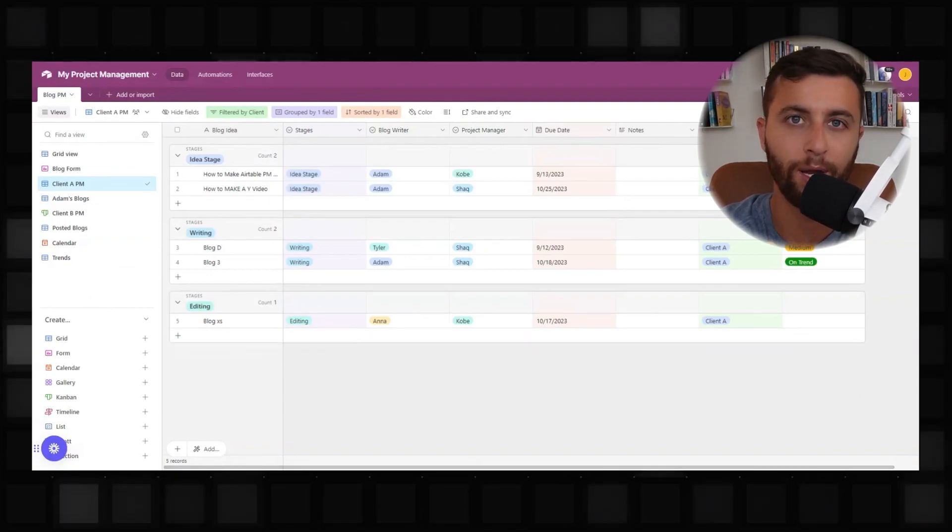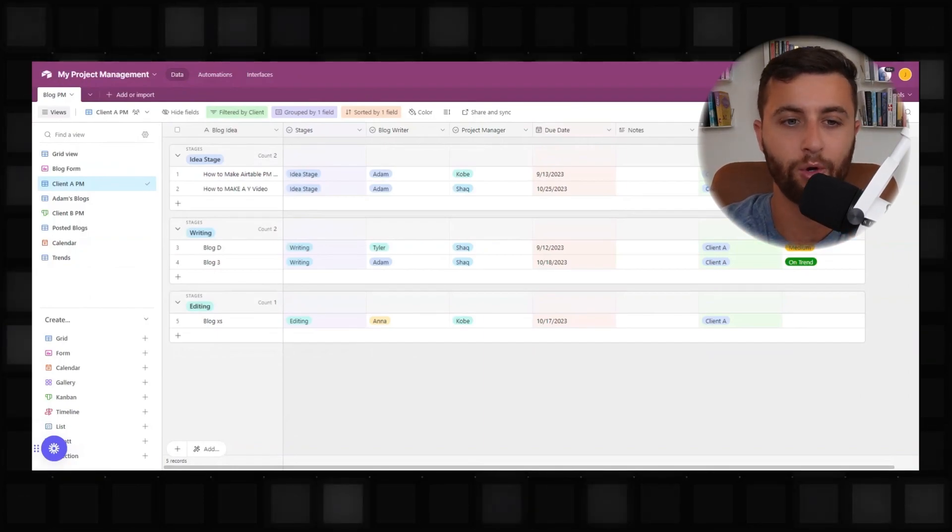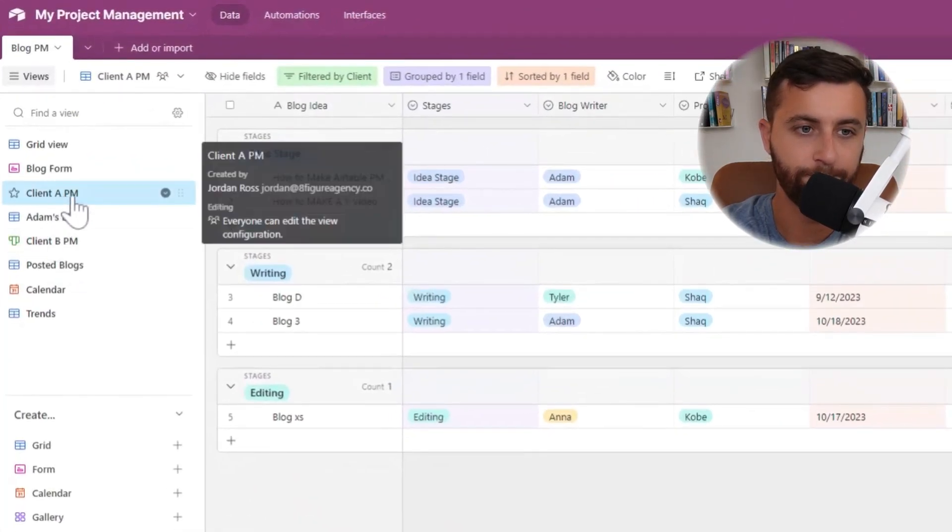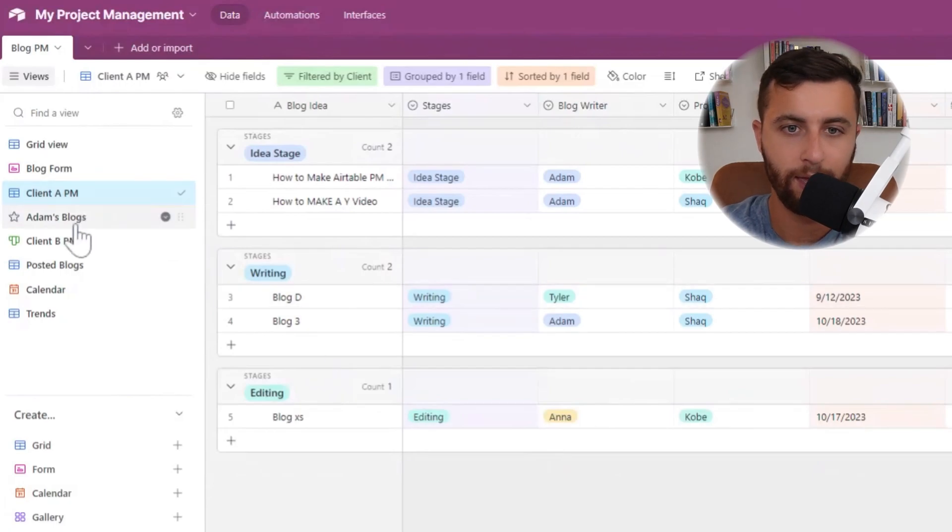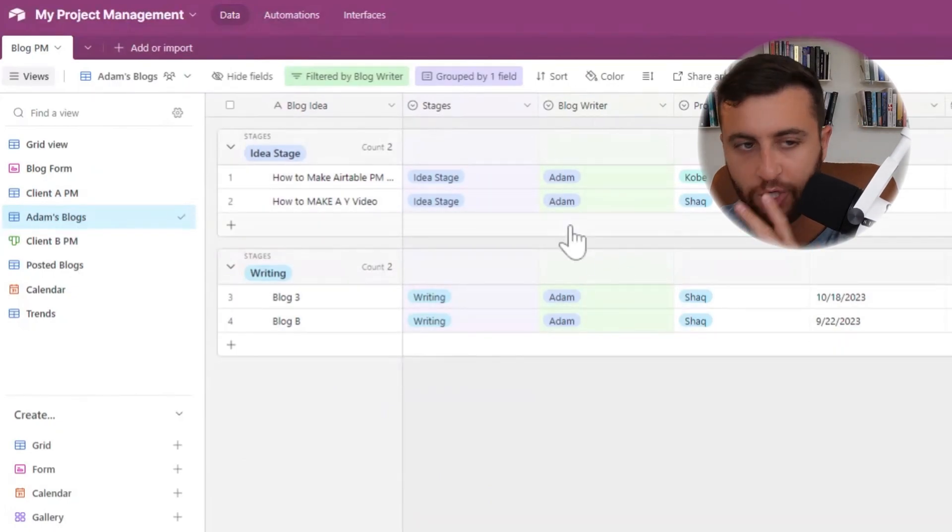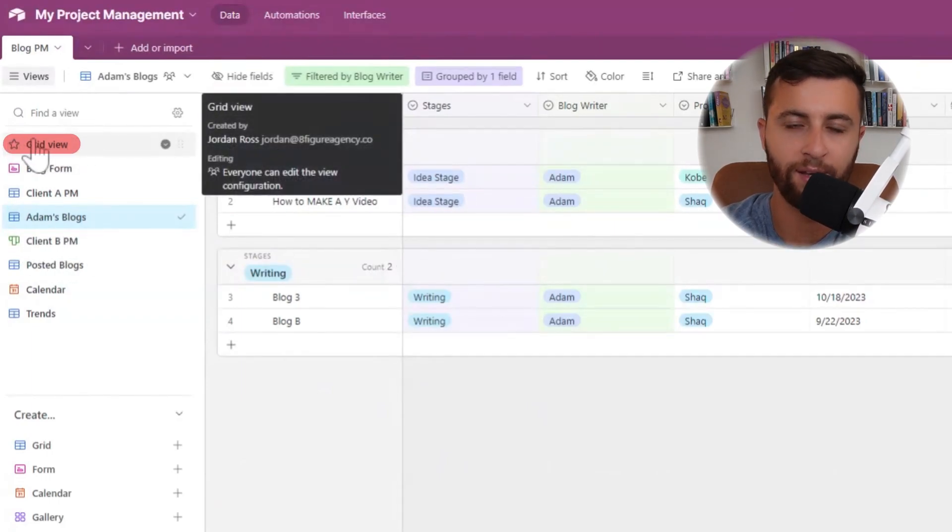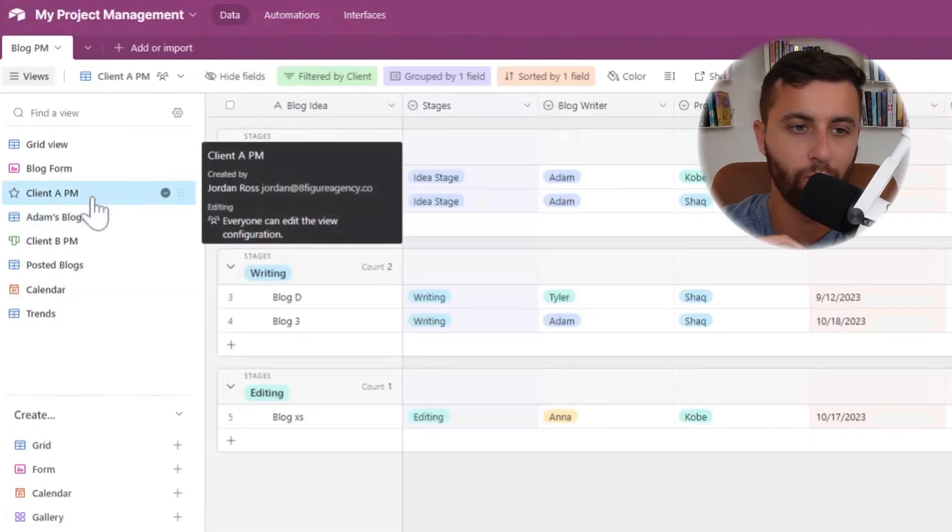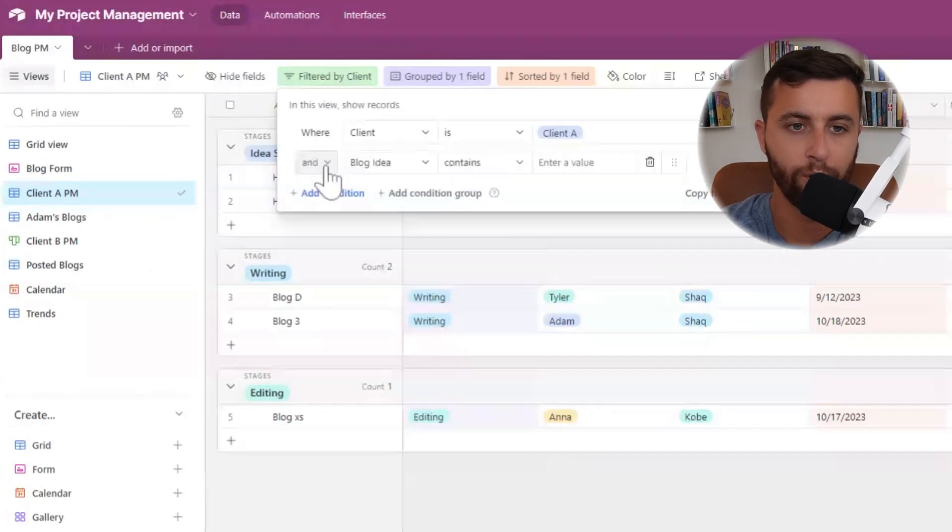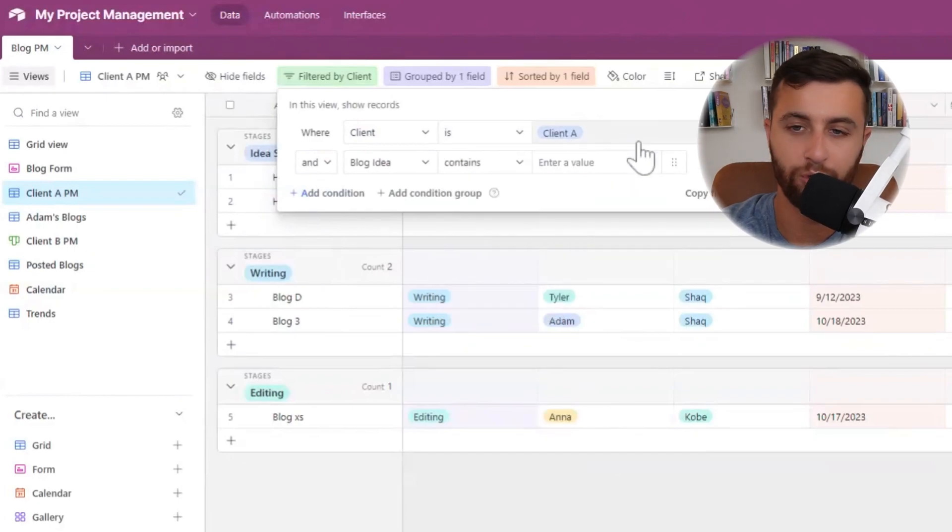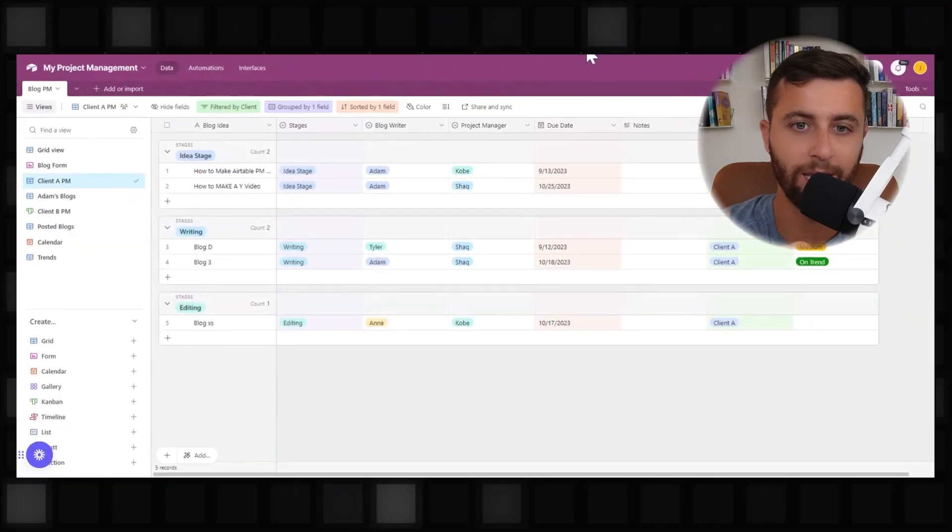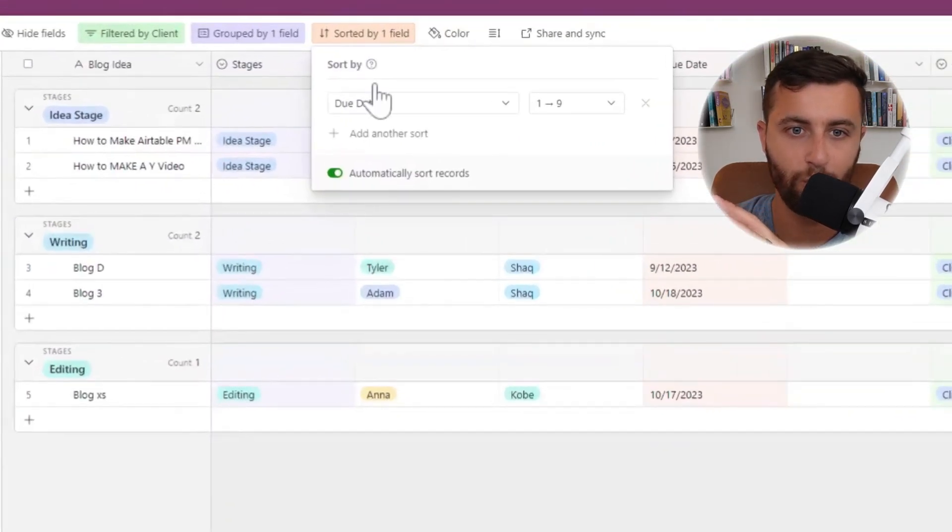So in this example, I want to focus on client A project management. We'll get to that in a second. Another example of what this could be is Adam's blogs. So whenever I make these subcategories, it's referencing the main grid view, which is really important to think through because when I get down here for client A, I'm going to create a filter where you click add condition and the category I'm going to choose is client is client A. I will only see all my client A's work. I will group it by stages and now I could see where everything's at. I could also sort it by due date.